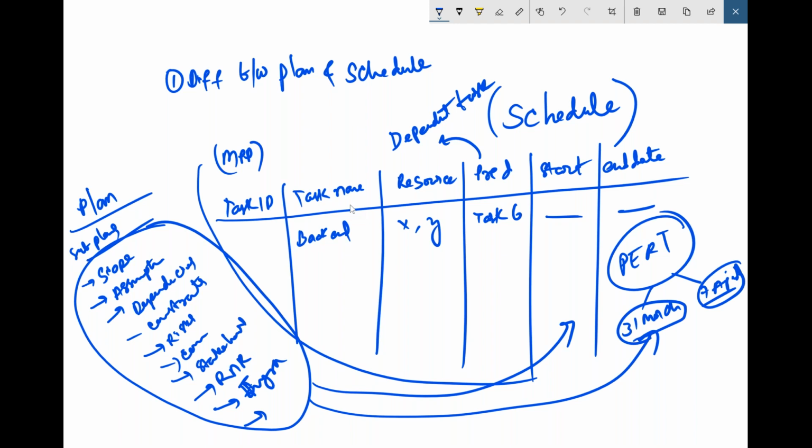So normally, in order to do such planning, behind this there is something called estimates, right? Whenever someone is giving estimates, the best way to do this is a technique we can follow. We see what is the best case, considering what is optimistic, what is pessimistic, and what is the most probable or mean, right? Based on that, we come up with the most suitable date. There is a formula which a lot of project managers follow. There are many formulas here, but one of the best which I like is pessimistic plus optimistic plus 4m by 6.